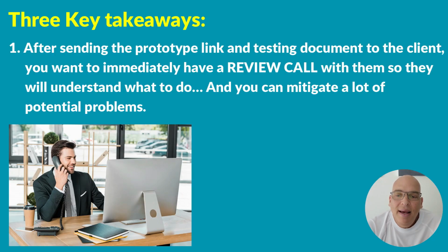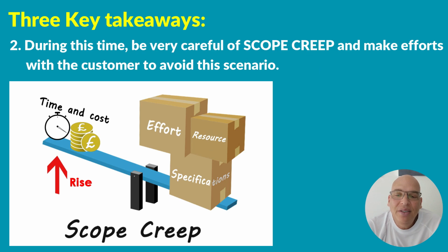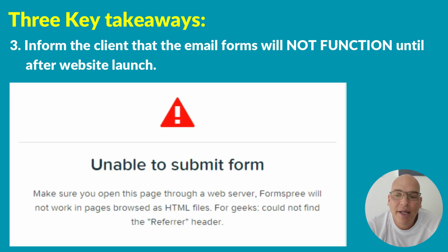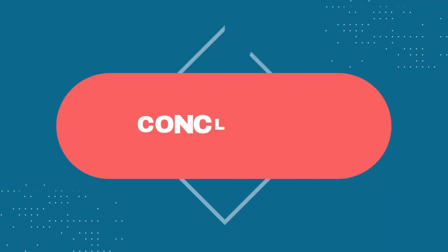Number 1, after sending the prototype link and testing document to the client, you want to immediately have a review call with them so they will understand what to do and you can mitigate a lot of potential problems. 2, during this time, be very careful of scope creep and make efforts with the customer to avoid this scenario. 3, inform the client that the email forms will not function until after the website launch.